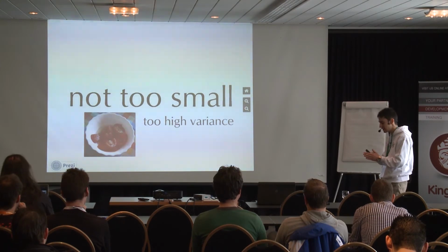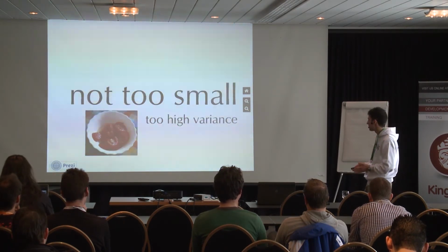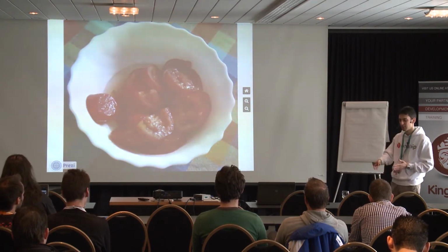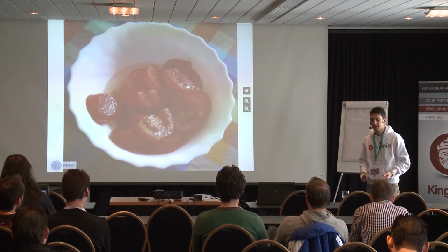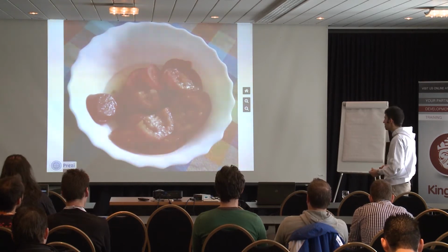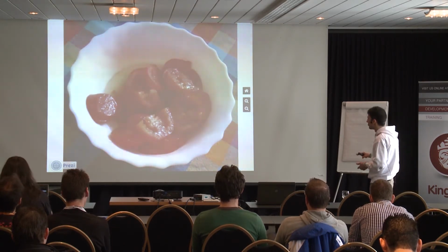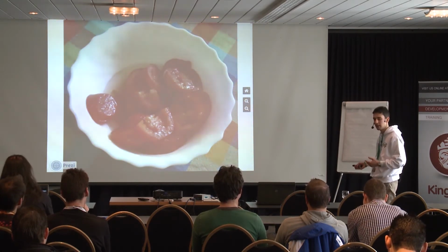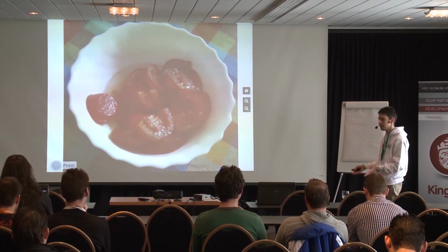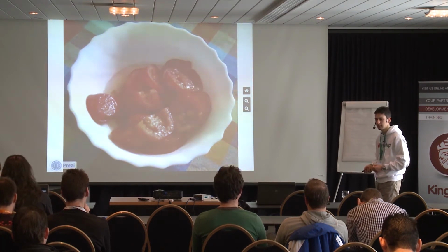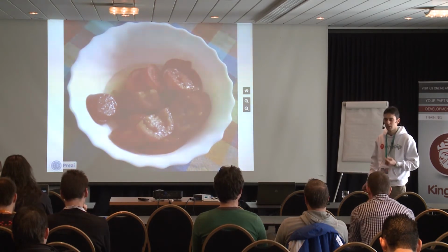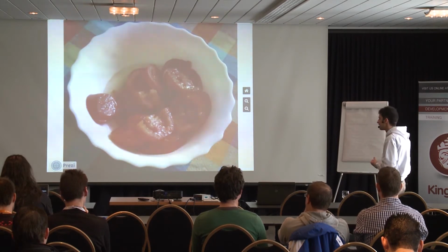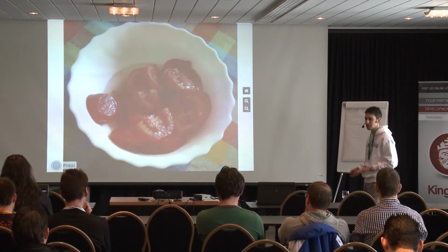If you're estimating something as half a Pomodoro, the duration of this task is actually a random variable that will take in reality from 0.1 to 2 Pomodoros. So if you're estimating something so precisely as half a Pomodoro, it won't be very good, because the error that you will make on that estimation will be bigger than the estimation itself. So when you have very small tasks, don't use split Pomodoros. Just bundle the tasks up, like we do with mail, for example, and estimate this bundle of many similar tasks in a single time. So I dedicate one Pomodoro to answering mails, and I don't estimate how long it takes to answer a single mail.